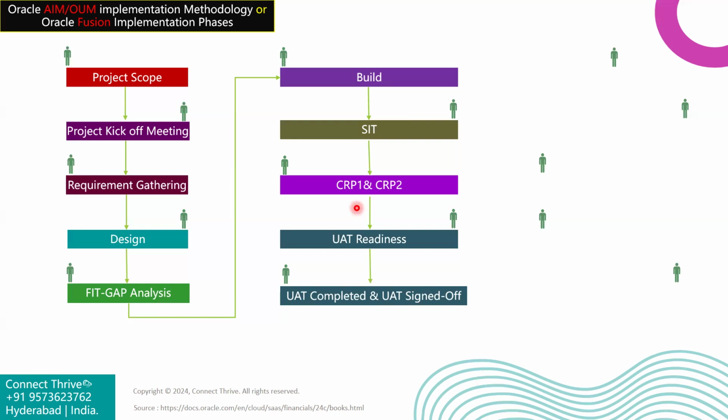Then we have to get the UAT sign-off from the business users. Once the UAT sign-off is provided by each business user along with the test results, we will submit that to our top-level team. Here we have all of IT. Here we will go to the next phase, the go/no-go decision. So, the go/no-go decision.